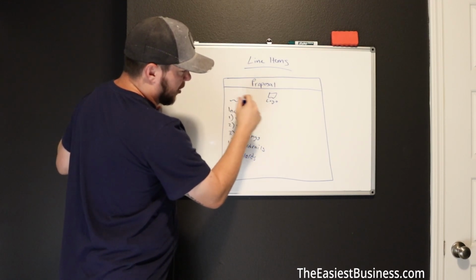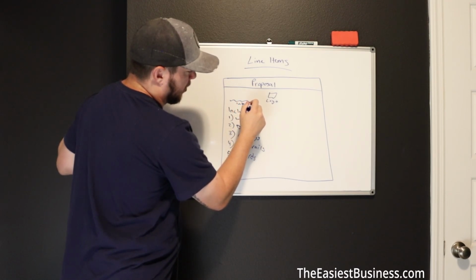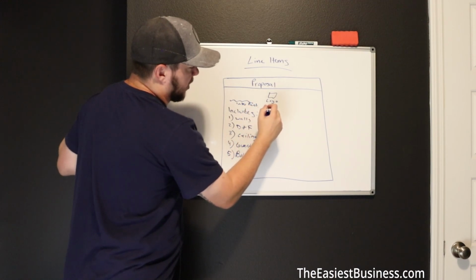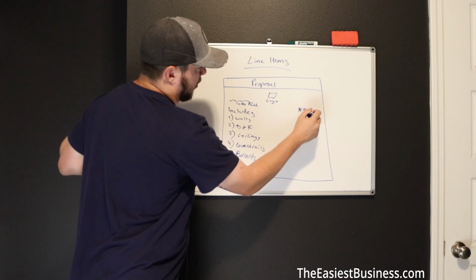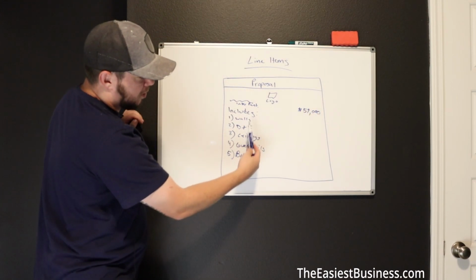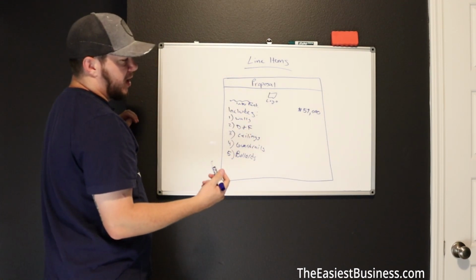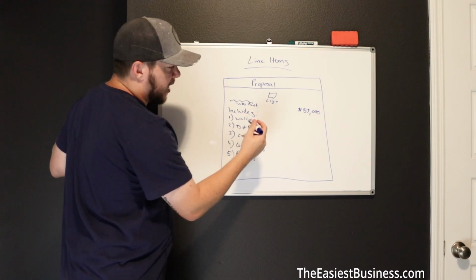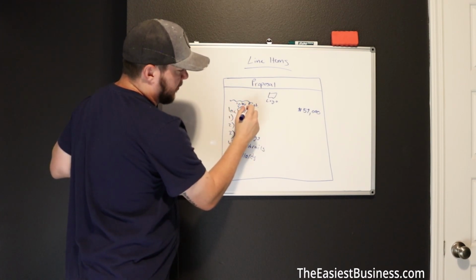Up top, basically this jargon is gonna be interior painting, whatever, and then you're gonna have a total over here, 59,000. And that number is what's gonna include all these scope items. So all these scope items are included in this number. And then if you have anything else to break out, you might do like sealed concrete floors.